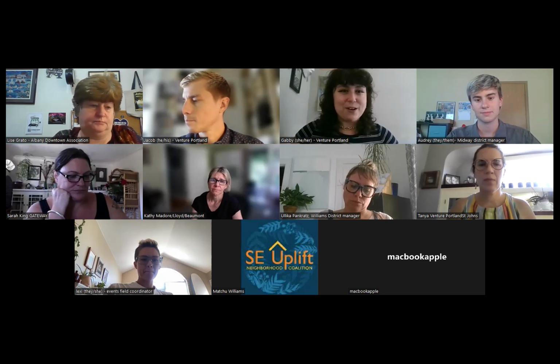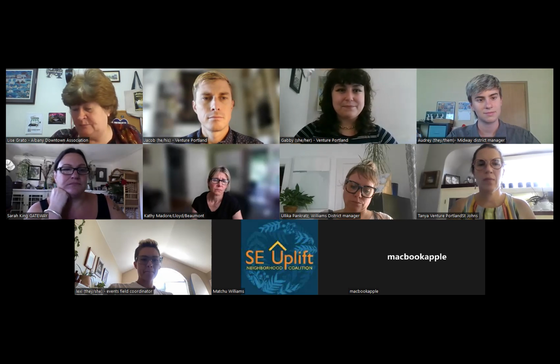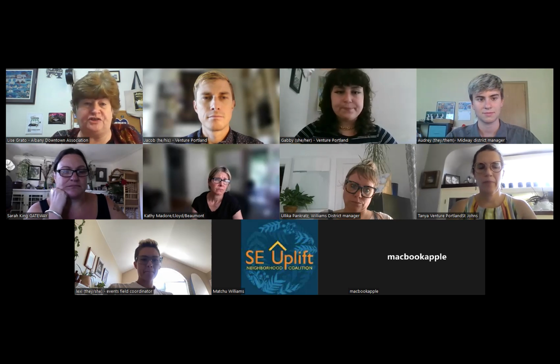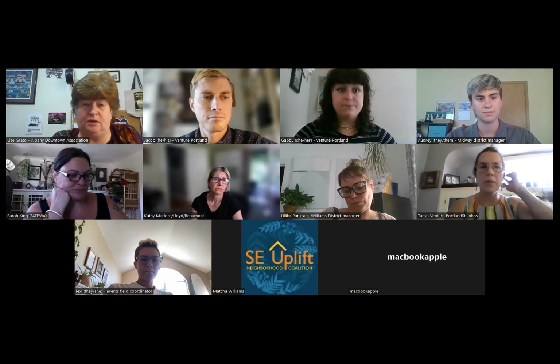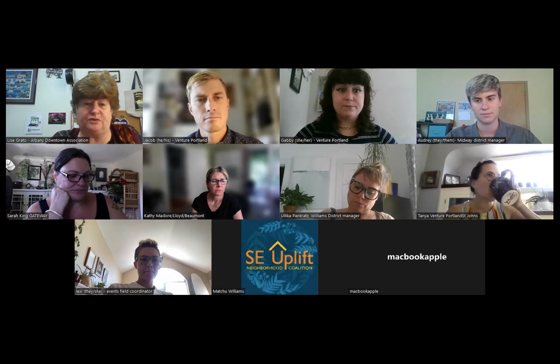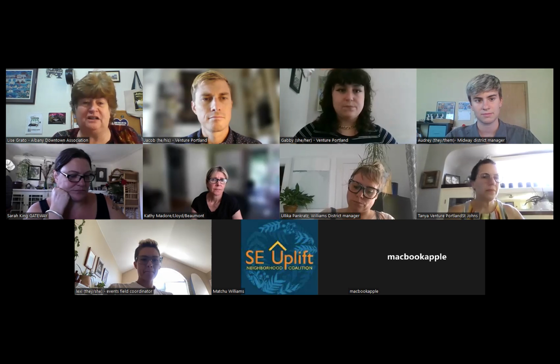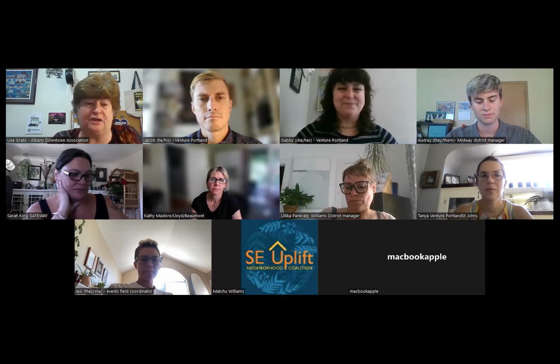Yes, question or comment? I was going to say where I see the downfall on committees usually is they just say they want more people. And I crossed out the word more and said 400, because more could be one more. And in your example, the same thing: you were looking for X number of members, and you got 2, and it was clear that you wanted more than 1 member and so many emails.